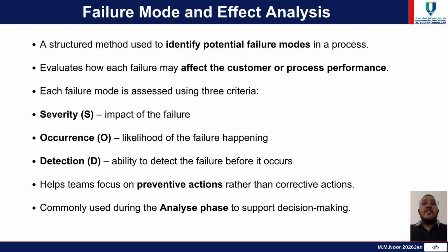FMEA. FMEA identifies potential failure modes and evaluates their risk. Failures are assessed based on severity, occurrence, and detection. This helps prioritize risk and focus on preventive actions.